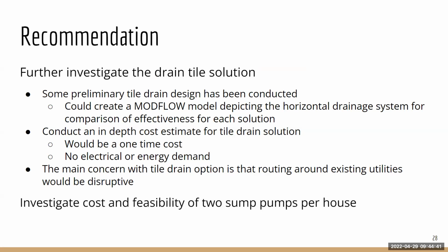So our recommendation moving forward, in addition to our scope of the project, there are 2 other groups. One designing the pump house, to go over the well, and another to design the sewers to take all the water from the pumps to discharge it into the creek. With that in mind, both of those projects have an additional cost. So our recommendation is to investigate the drain tile solution. Preliminary design was done by the Army Corps of Engineers, and they determined it to be a little too invasive for their scope of the project.